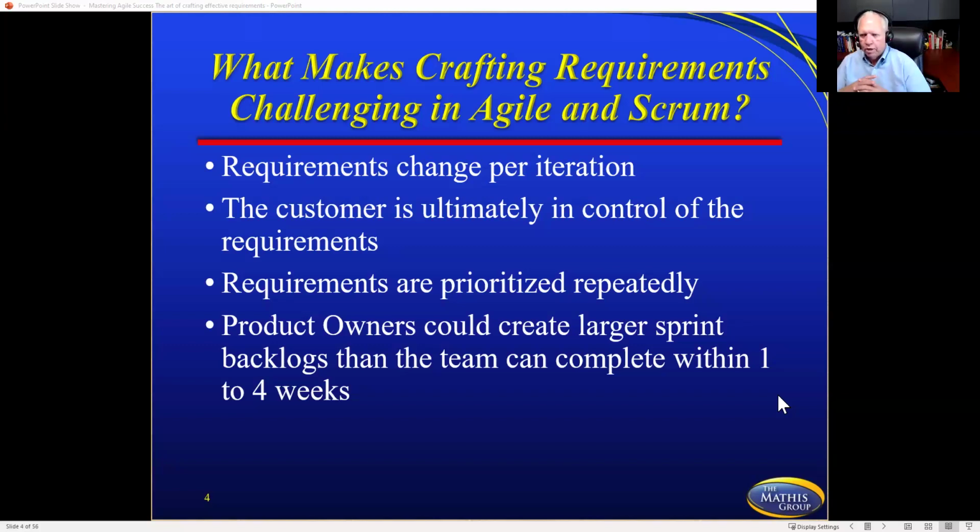And this last bullet point here has become a big challenge because many of you maybe have noticed that you were doing 2 and 3 week sprints, and now you're doing 5 and 6 week sprints, and eventually somebody's wanting you to do a 3-month sprint. All of those create a huge challenge if you're trying to run Agile. And the reason is because really one of the fundamental teachings, whether we abide by it or not, is we're to have no change orders in the middle of that sprint.